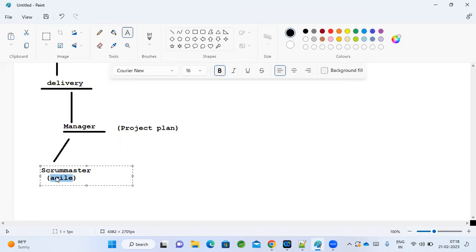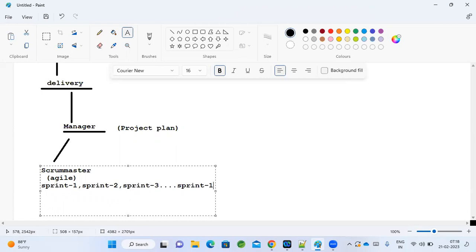In agile, we deliver sprint-wise. We deliver his product sprint-wise. Let's say 10 modules are there. For each module, we will conduct one sprint or two sprints. Sprint-wise, we will give him deliveries. Phase by phase, sprint by sprint, we give deliveries. In between, when he sees he wants to make changes, by the next sprint he can add those changes so that he can improve his product. We will talk about it.